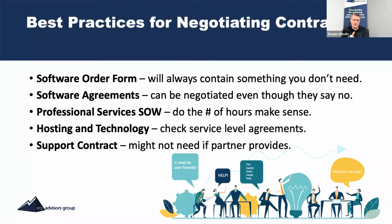Professional services statements of work. Make sure that the number of hours makes sense, that they're not putting too many hours in there for sure, that it actually does. If they put in training for 2 hours, is that enough time for you to get your people trained? 2 hours from them. It might be, because then they're going to train you, and then they're going to get on a boat to wherever and then see you later, right? Chances are there's not going to be enough time in for training. I'm just telling you that right now.